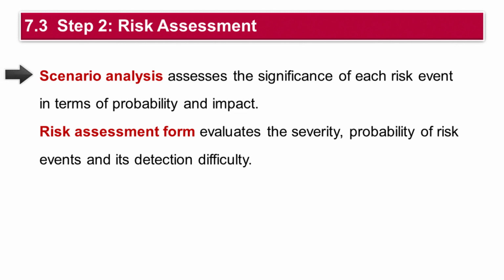Scenario analysis is a popular and straightforward technique for risk assessment. Here, the team evaluates each risk based on how probable an event is to occur and how much damage it could cause if it did occur. For example, while a project manager being struck by lightning might significantly impact the project, the likelihood is so low that it's not a major concern. On the other hand, employee turnover is a common occurrence with potential negative consequences. In such cases, proactive measures like staff development or retention incentives can be implemented to mitigate the risk.